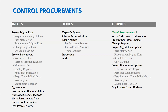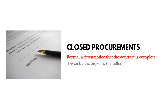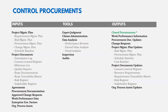The key output of Control Procurements is closed procurements — formal written notice from the buyer to the seller that the contract has been completed. Other outputs can include work performance information, change requests, and updates to procurement documentation already created.